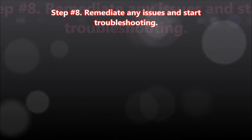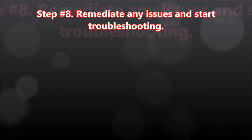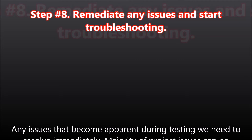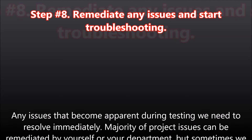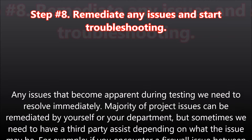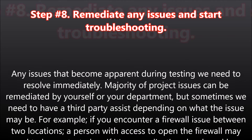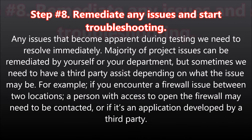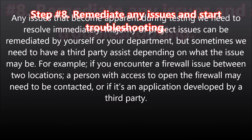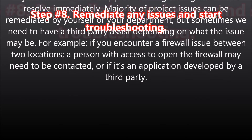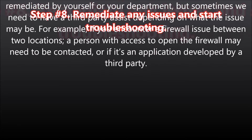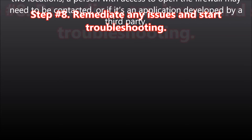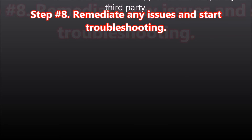Step number eight: remediate any issues and start troubleshooting. Any issues that become apparent during testing need to be resolved immediately. The majority of project issues can be remediated by yourself or your department, but sometimes a third party is needed depending on the issue. For example, if you encounter a firewall issue between two locations, a person with access to open the firewall may need to be contacted, or if it's an application developed by a third party.